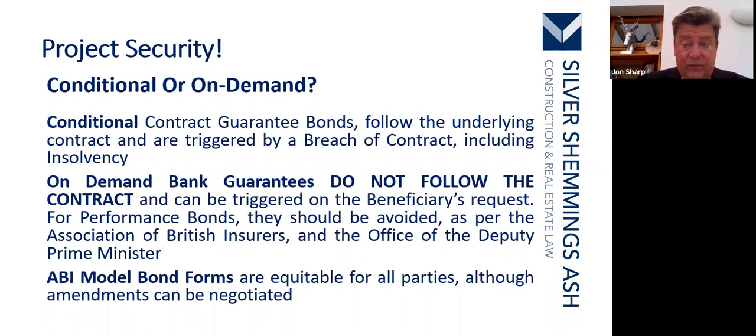So certainly for performance bonds, avoid this. They should be avoided as per the Association of British Insurers and the Office of the Deputy Prime Minister. So I would always go for surety rather than anything provided by a bank. Bank documentation is always on demand, and that will cause problems.